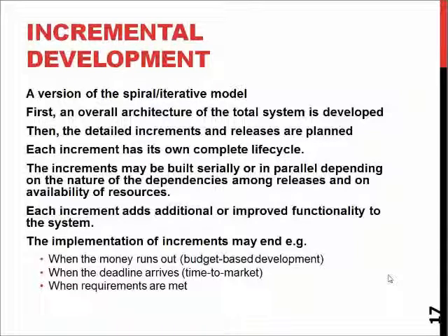This means that on the first project you only have to have funding to do the core product. You don't have to worry about the content, because if the product starts to sell, then you have money to pay for the development of the incremental features or additional content. But it also makes it possible to have a really solid plan for a simple core system, and then just start adding things into that one.